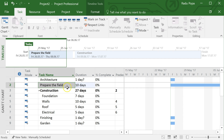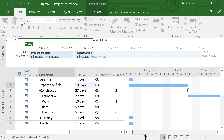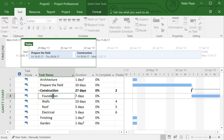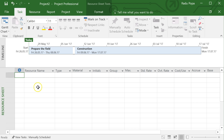We use Project a lot to create timelines, but planning is not only about time — it's also about resources. What are the resources involved in this project? Project offers a way to assign resources to tasks. For example, for the foundation stage I'll need a machine to dig the ditch or five people to do it manually.